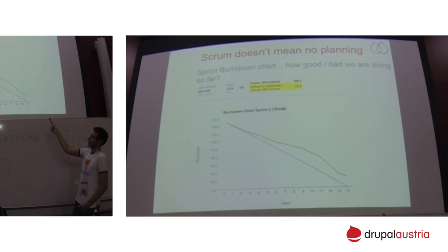So how I collect that one, I'm listing all the user stories that we have in the current sprint. And then I'm checking how much time the team is working on them. If I have some questions about their progress on a daily basis, I'm talking to the guy saying, all right, you spent 6 hours on this user story, but what is actually your progress today in terms of story points? And then you're just simply updating the numbers on daily basis and you get the data here.